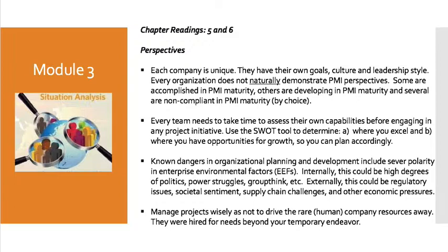Also, things you need to take into consideration. Everybody needs to understand their current level of capabilities before they begin any project. Okay, so any and every project. So even if you started one in the winter, when you get ready to start one in the spring or the summer, you need to do a new SWOT analysis because the conditions within your company may have changed. Okay, and some of the individuals, some of the capabilities, some of the equipment that was available previously may not necessarily be there anymore. So we always try to start with a SWOT analysis so that we can have the most accurate understanding of what we can and cannot do so that we can plan accordingly.